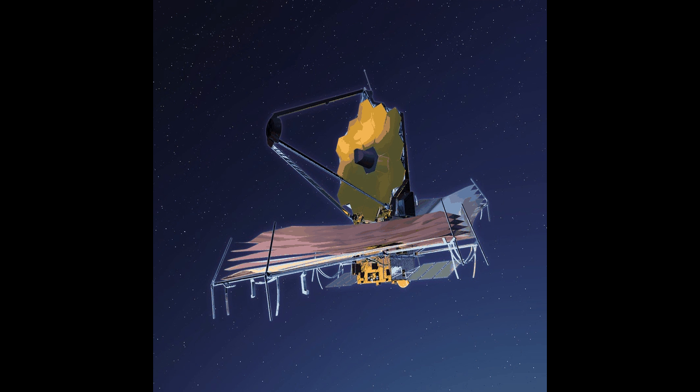On March 27, 2018, NASA pushed back the launch to May 2020 or later, with the final cost estimate to come after a new launch window was determined with the European Space Agency. In 2019, its mission cost cap was increased by $800 million. After launch windows were paused in 2020 due to the COVID-19 pandemic, JWST was finally launched at the end of 2021, with a total budget of just under $10 billion.